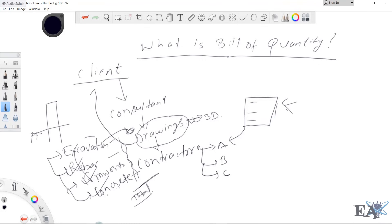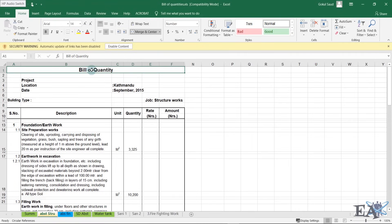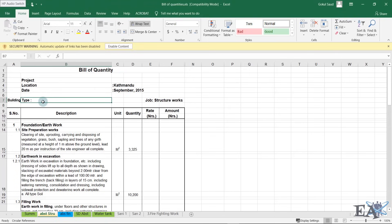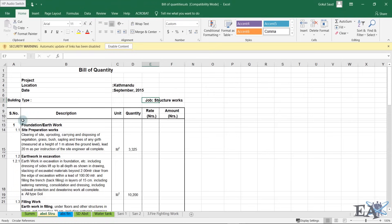Let's look at how an actual Bill of Quantity looks. At the top, 'Bill of Quantity' is written, followed by the project name, location, date of commencement — for example September 2015 in Kathmandu — building type, and job type such as structure works. The columns are: serial number, description of work, unit of measurement (running meter, meter square, meter cube, ton, etc.), quantity, rate, and amount.